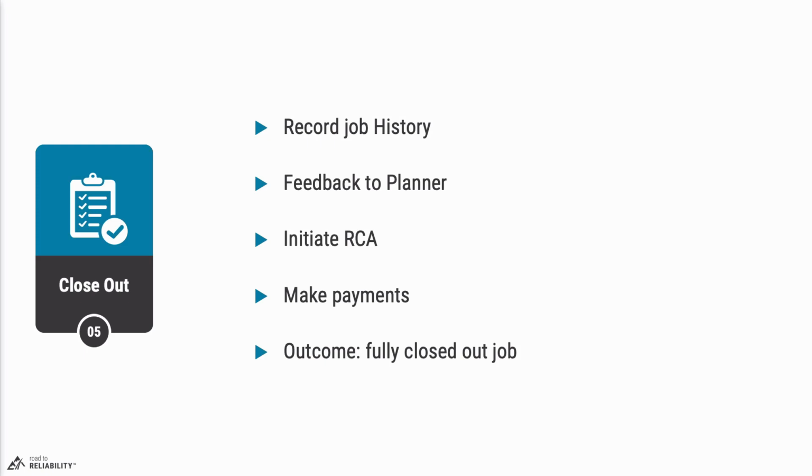Once the work is physically completed, it needs to be properly closed out in the CMS. That means the crew will need to record the technical history and provide feedback to the planner on the quality of the job plan. Was everything there? Were there any parts missing? Was the sequence correct? Were the job durations right? All that needs to be fed back to the planner.